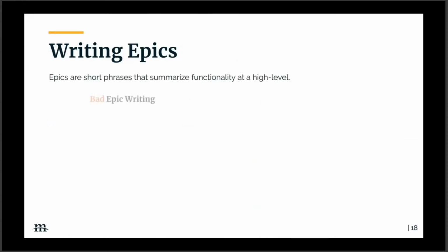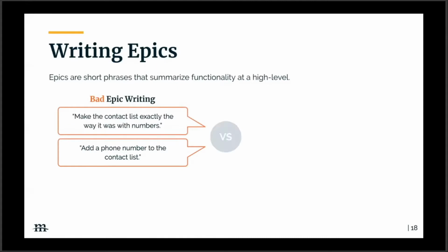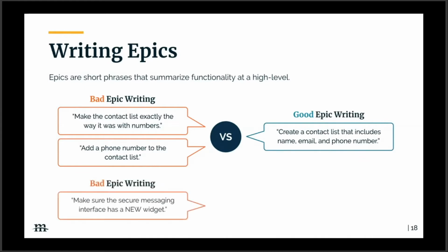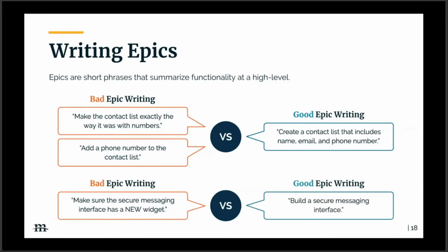Let's talk about writing epics. What you'll want to do is assign what's called a product owner. Maybe that's you. The product owner should be someone who has enough time and knowledge to dedicate to the overall project and the process of pulling together epics and writing user stories. And just as a side note, senior leaders like VPs or executive levels are often not really the best suited for that role because their calendars are typically full already.